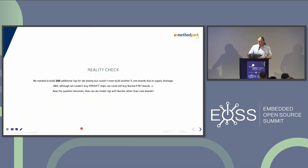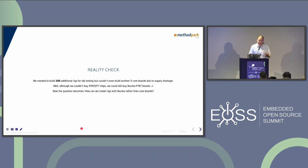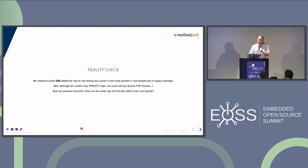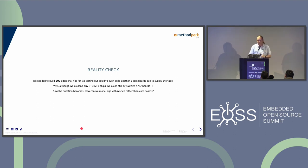Then reality knocked again - this time it was the corona crisis and supply chain issues. We had to build 200 additional rigs because the life scientists were satisfied with performance and needed them for statistics. But we couldn't build even five more core boards because the MCU on Mouser and all other platforms went out of stock, with lead times of 53 weeks or more. To our fortune, we could still buy Nucleo boards - we couldn't buy the STM32 to put on our own board, but we could buy a bunch of Nucleo F7 boards.